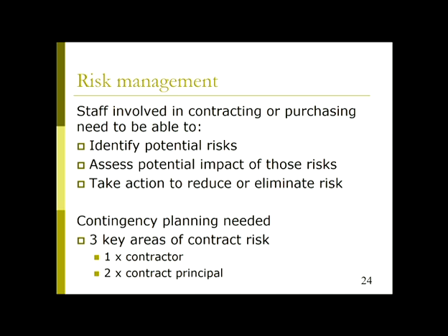Now, this is where the project and the contracts are intimately intertwined. The risks of the project are also risks of the contract. So they happen together. When you're thinking about the risks to your project, then minimising or avoiding them has to be incorporated into the contract. That's the way you control the risk, by putting the contingency planning into the contract. Okay, important aspect of risk management.